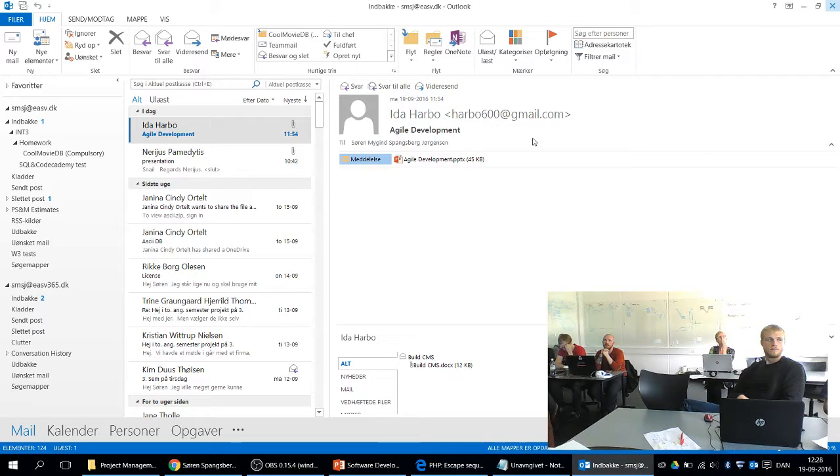Now, as we all know, as we've all experienced and felt horrifically, when you're working on a project, time is a massively important resource. And in order to estimate time, you have a very specific method within Scrum. This is called the burn down chart. It is essentially, as you can see, a pillar diagram that shows all the work that you have left in this sprint or in the entire project, if you will. And as you can see, it measures in the different days, so you can see how the different tasks that you need to do are slowly whittling away, which means that you can get a very clear idea of when you're going to be done with the entire thing.